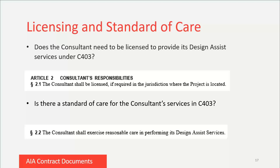Design assist services come in a variety of shapes and sizes. To what standard of care should the consultant be performing its design assist services? Unlike typical architects and engineers who must perform to a common law standard of care, there is no generally established standard of care for consultants performing design assist services because of the wide variety of services they can provide. When drafting the C403, we drafted it to require the consultant to provide its services using reasonable care — the same standard used in the A133 with regard to the CM when providing its pre-construction services.